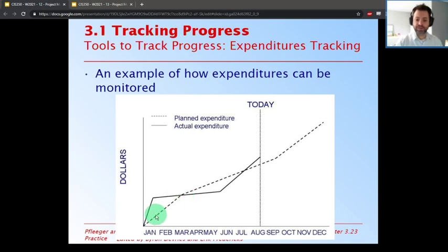From January to March, we have a very quickly, linearly increasing line, right? Maybe we are bringing on various engineers, requirements engineers, maybe they cost more, just kind of depends. From March to September, we see that slope kind of ease up. Maybe we don't need as many people on the project. Maybe we don't need to pay a particular licensing fee or something like that. And we're kind of planning out this budget. And that would basically be let's populate a bunch of spreadsheet lines with how much we expect this month to cost. And then October rolls around and we ramp up into delivery time, we ramp up into release.